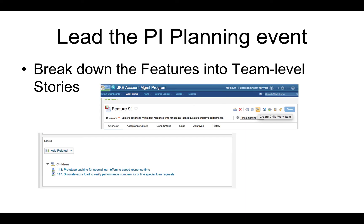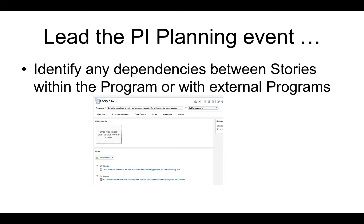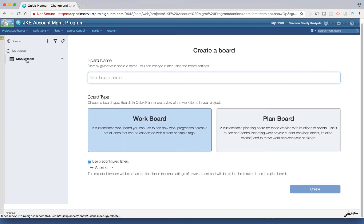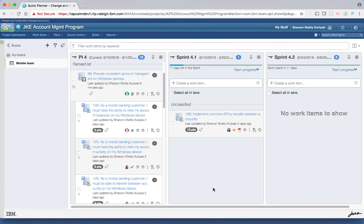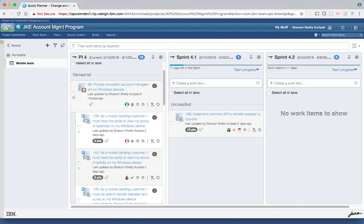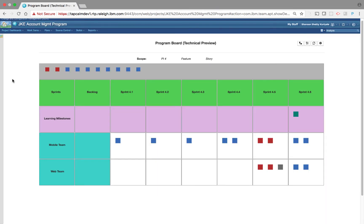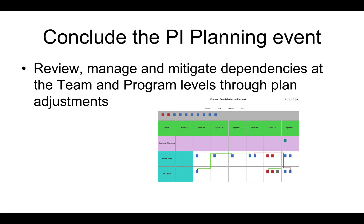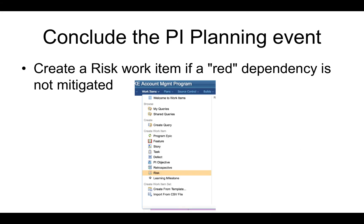The next step is to identify stories and tasks for the respective team. The product owner works with the development team to review the features and break them down into stories. They also articulate if there are any dependencies with stories owned by other teams. Breaking down the features into stories can be done in the quick planner view. Adding dependencies can be done directly in the program board. You can click on a feature to view story items — it shows the list of child items for that feature and you have an option to add dependencies. The program manager reconvenes program members to review the results of the team planning breakout sessions. If any dependencies cannot be mitigated, a risk work item is created if needed.